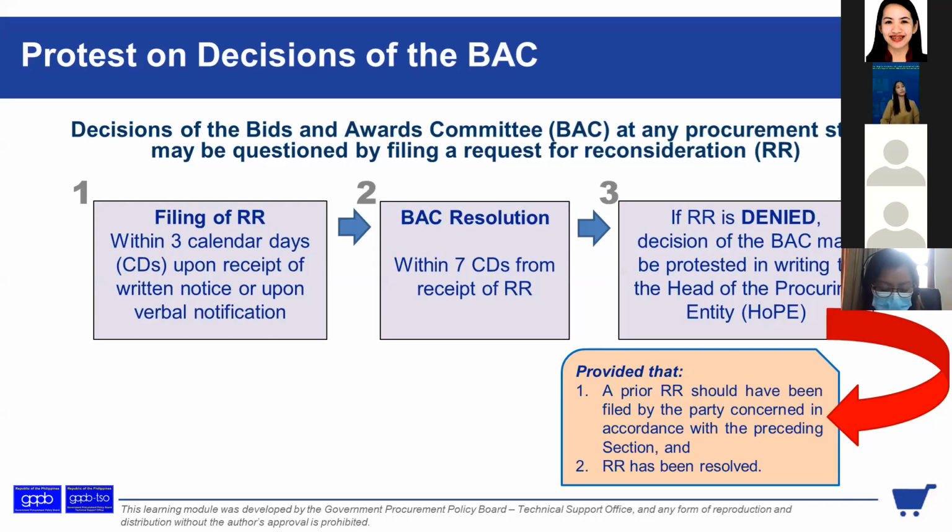So, then, after that, matanggap ng BAC, then they will have to decide within 7 calendar days. They will have to come up with a resolution. Why would I say resolution? It's because the BAC is a collegial body. Diba, grupo kayo? Jury duty nyo yan. So, BAC shall issue a resolution within 7 calendar days from receipt of RR.